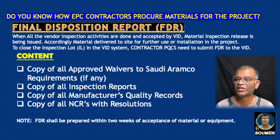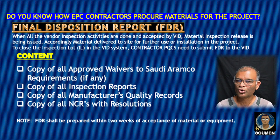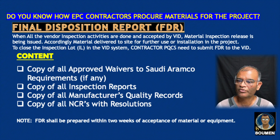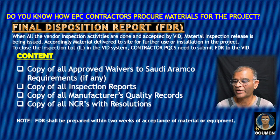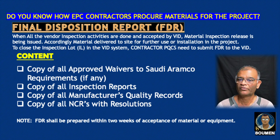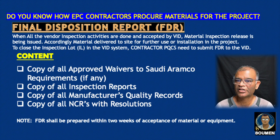To close the inspection lot in the VID system, the contractor's PQCS (Procurement Quality Control Supervisor) must submit the Final Disposition Report (FDR) to VID. The FDR contains: copies of all approved waivers to Saudi Aramco requirements if any, all inspection reports, all manufacturer quality records, and all NCRs/EDRs with resolutions and proper closure documents. The FDR shall be prepared within two weeks of acceptance of the material or equipment. Site inspectors also require this document when conducting site material receiving inspection.